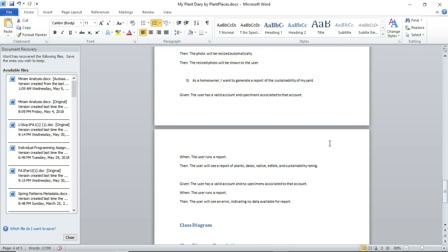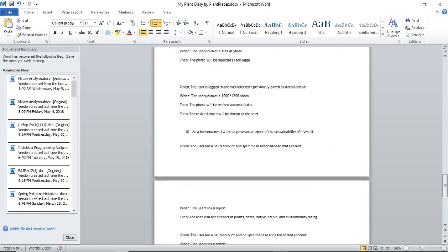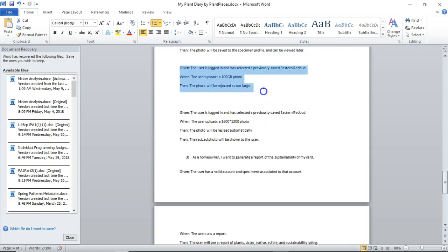So you see, by elaborating through these examples, we get a really good grasp of all the things we're going to need to cover. Because when we tend to estimate things, we tend to only think happy path. We don't tend to think what happens when these things fall over. But more importantly, our given when thens will quickly turn into a set of behavior-driven design, test-driven design unit tests.